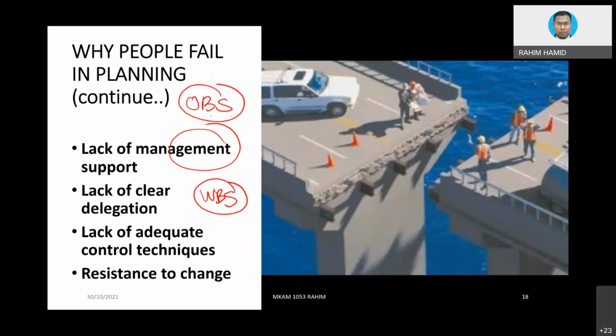When you look at your organizational chart, it basically reflects this OBS. The WBS is almost the same kind of chart, but instead of putting people, the CEO, the general manager, head of department, and all the subsequent people inside the organizational chart, we replace that with work.